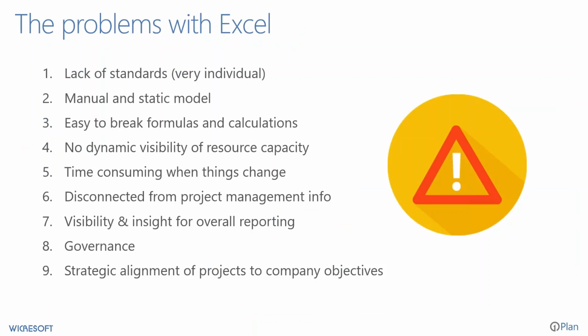The problem with Excel is that there's a lack of standards. It's very freeform. It's a manual and static model where resource management is very fluid. And every time there's changes in time phasing, the ripple effect of that makes it very hard to keep it up to date. The nature of Excel, it's easy to break formulas and calculations, so the veracity of the data can sometimes be questioned in the roll-ups. And there's no dynamic visibility of resource capacity as new people come on and our staffing levels change. So the idea here is that there's not an ideal way to do it, but it's something that we've done because we're trying to fill a need with the tools we have at our disposal.